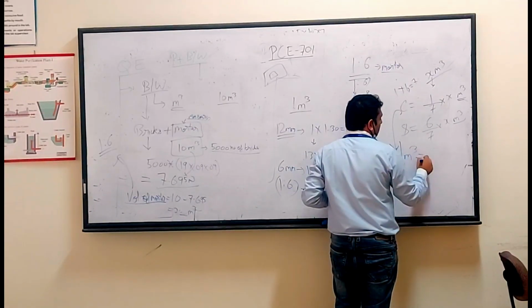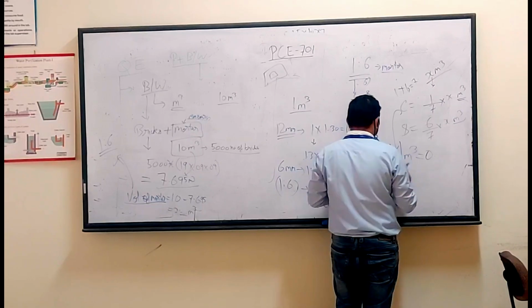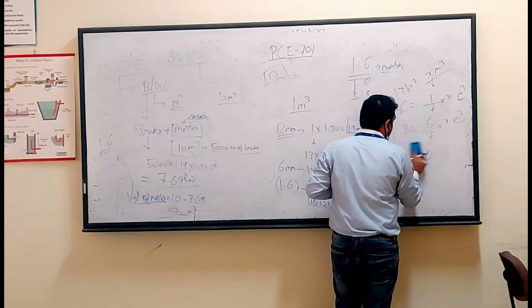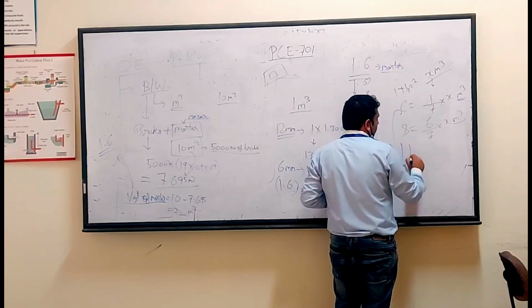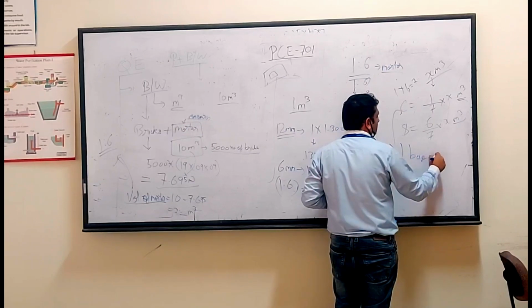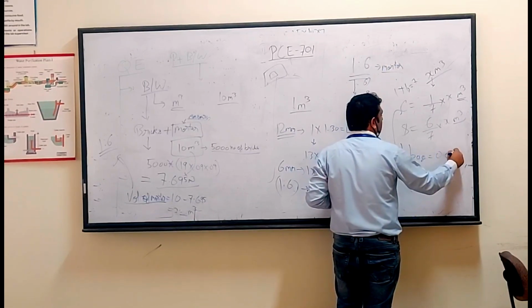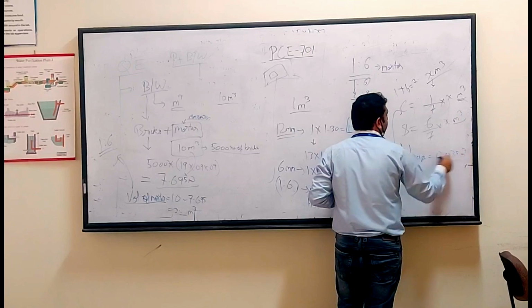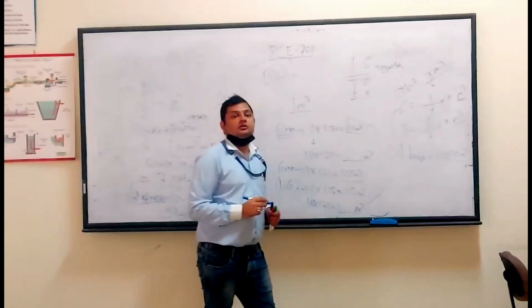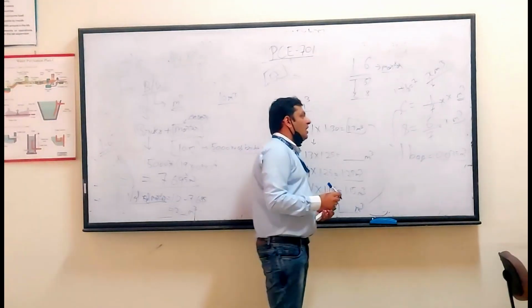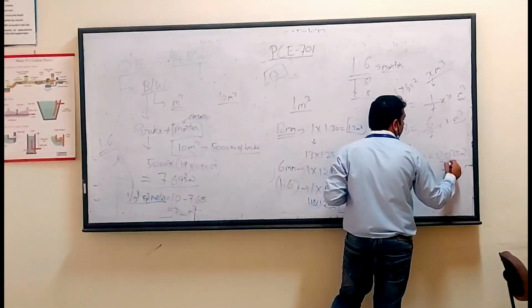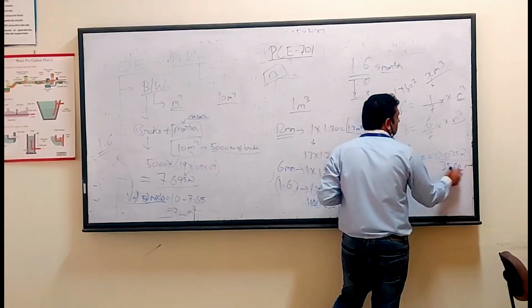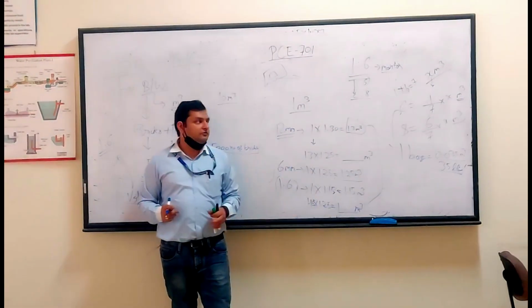The conversion factor is, sorry, 1 bag of cement is equal to 0.035 cubic meter of cement. This is the conversion factor, that is, 1 bag of cement is equal to 0.035 cubic meter. This is the quantity conversion for cement.